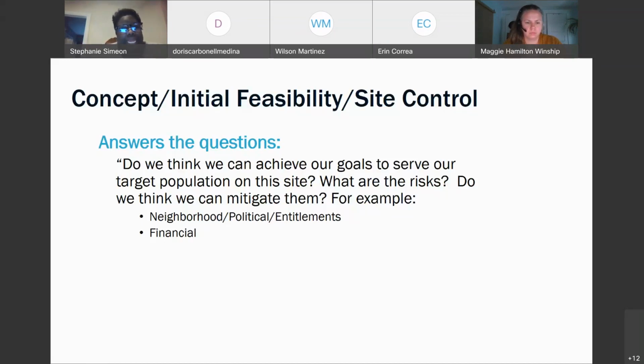Now, remember from the last slide, we looked at 1 or 2 years. They're going to give you 1 year, so you need to get serious. But if you're going after a much larger project, anything in the millions, that's most likely going to be a low-income housing tax credit deal, housing trust fund and stuff like that. It does take you a while to secure those funds, one, because they don't come around all the time. Sometimes they used to be only once a year. I think now they're doing twice a year. But either way, you still need to show site control.